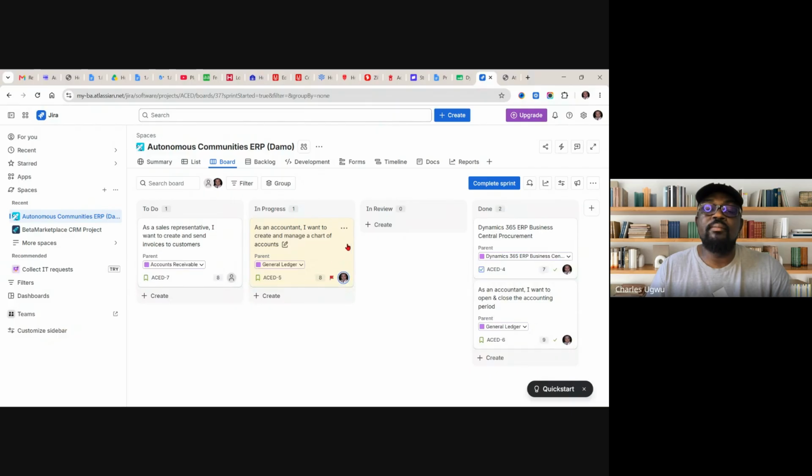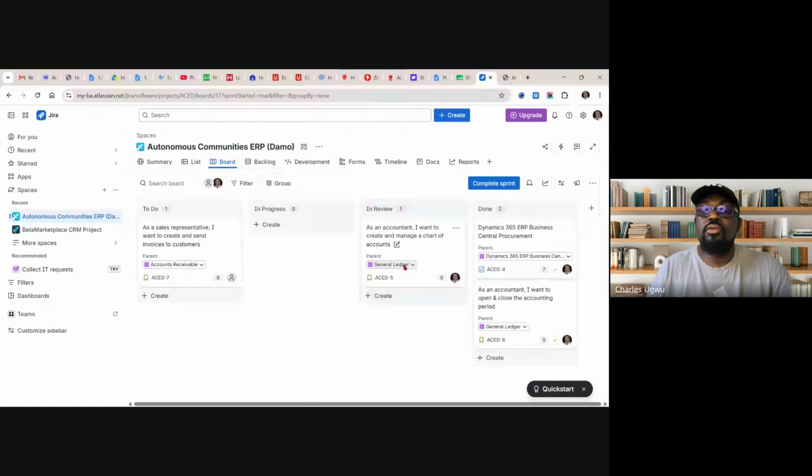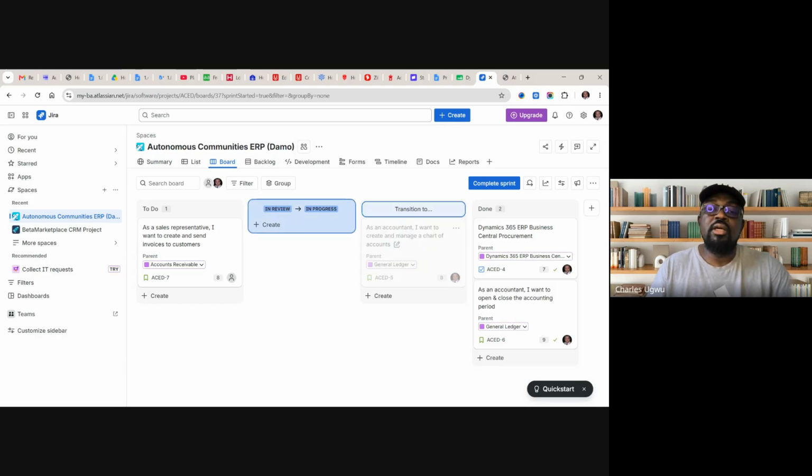Once sorted, you remove the flag. Remove the flag. You see, the Scrum Master has cleared the road now. You continue your work, and then you put it on review. The business analyst or the tester will come and say, okay, I've gone through this and there is a bug in this. You move it back again.